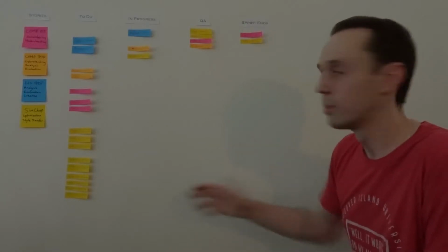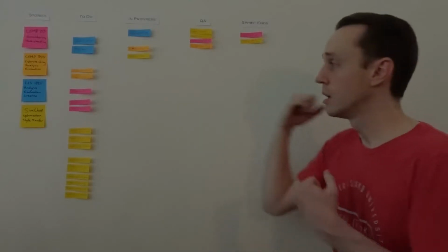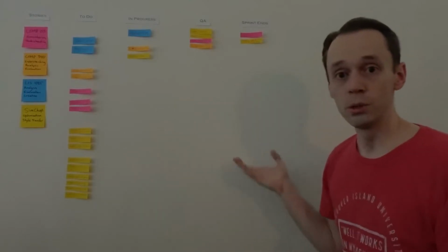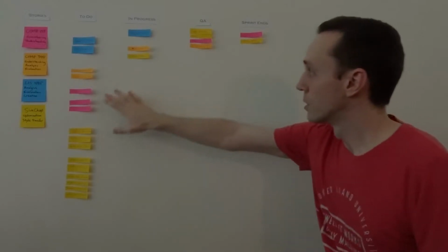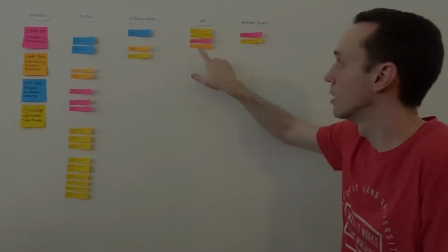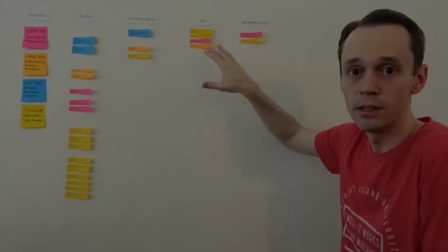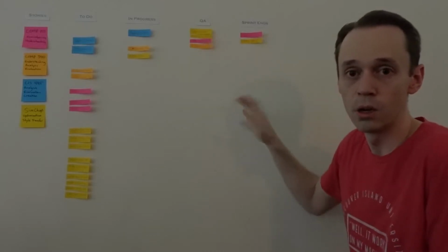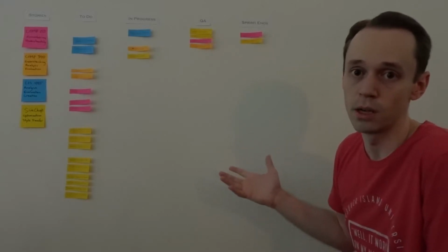So it can really help to just work with a Kanban board, keep all your work organized. You have it visual, you look at it in one glance, and you know where you're at with your project, with your tasks. You're keeping track of how much time it takes you when you're completed them. You write that time down on each little task, and then you can analyze how quickly you're doing your work. You can start to experiment on maybe doing things in a faster way.